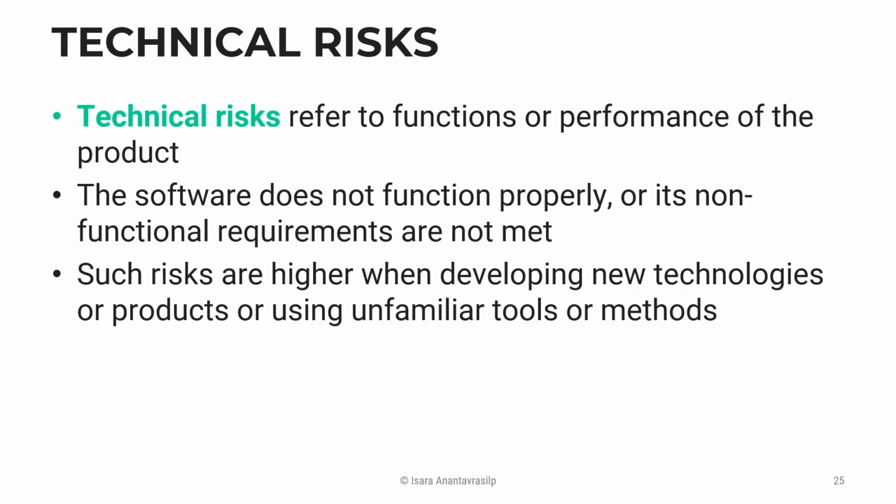And sometimes you have what we call dependency risks. Basically, what it means is you are relying on external libraries, external components, and one day these components get updated or deprecated, and then your software is not compatible with these dependencies anymore. And such risks could be much higher if you're not familiar with the tools you're using.